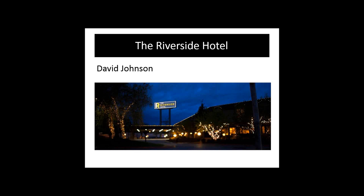Can you give us any insight on that payback or incentives or the financial motivation to address lighting at that level? Yeah, it was great to have Idaho Power step up and pay for a big part of that. So just doing that math, we were closer to like 4.2 years on some of them, based on estimates, of course.